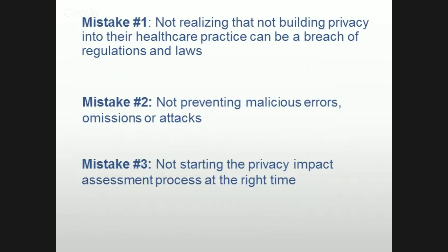Mistake number 3, not starting the privacy assessment process at the right time. This is really important. A lot of people leave it way too far to the end, after they've signed the contracts and they've already decided what their workflow process is, and they're in the hiring stages for this new project, without realizing that they don't have the legal authority to do something and they have to go full stop.